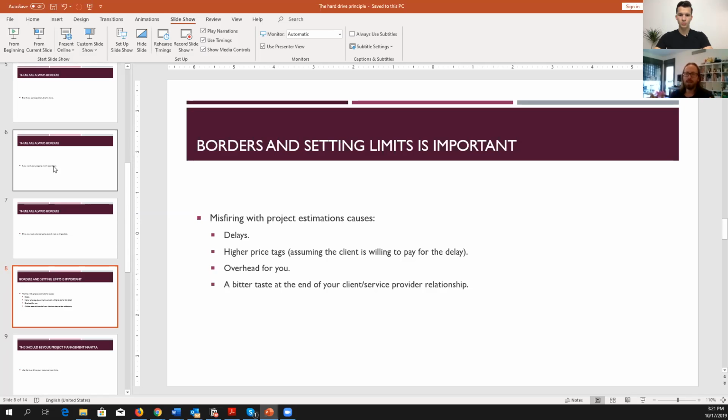A 3-week delay is 3 weeks that someone is on your payroll as a service provider, which can basically lower the profitability of the entire project, okay? So you want to share this with the client as well. If there is a problem with the project, he will pay his share for causing the delay. It's really important, and clients are willing to do it.